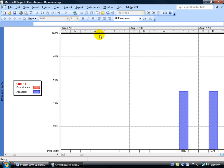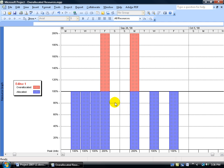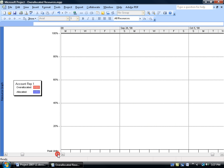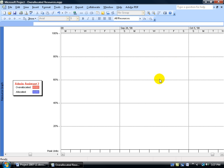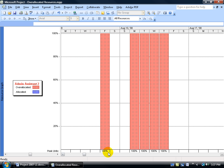Let's go to Editor 1. As I scroll through the timeline, I'm getting later in the year. There for Editor 1, they're over-allocated on two days, working beyond the full 8 hours. For Administrative Assistant 2, because I scrolled right and went further in the timeline, they're scheduled earlier so I need to go back. There it is — at 100%, even full-time, it's still in red. Any time you see something all in red at 100%, either they're working on non-working days — which they're not — or their availability is not in August. As you recall, Administrative Assistant 2 is available in October.